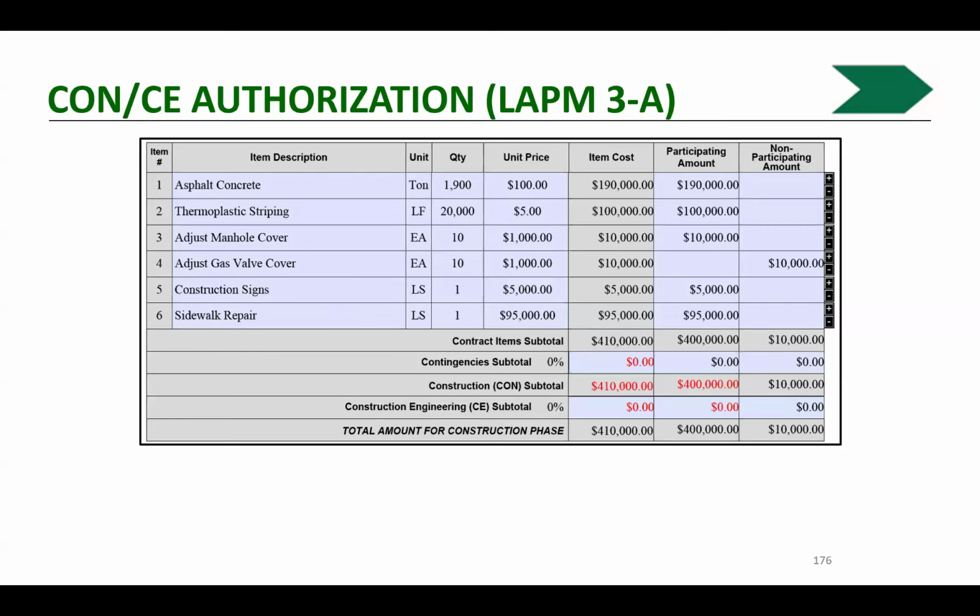I just want to super highly recommend that the agencies always put in at least a little bit under their construction engineering row, because you can always move that money out if you need it to cover a higher bid, but you can't add it in later. The construction engineering covers the cost of your local agency staff to do some of their work. If you have an RE that's on staff, their salary can be covered with this, that kind of thing.